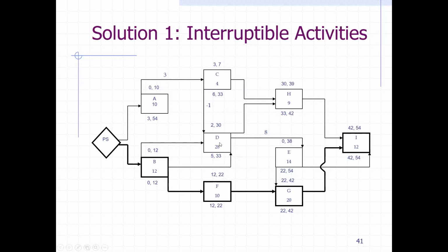Then for E, excuse me, it is dependent on D, but as far as the finish, because it has a finish to finish relationship but doesn't have a start to start relationship, which means E early start is 0 here. See, this is new, right? You're in the middle of the project, you start with 0, but you have a duration of 14 days within an interval of 38 days.